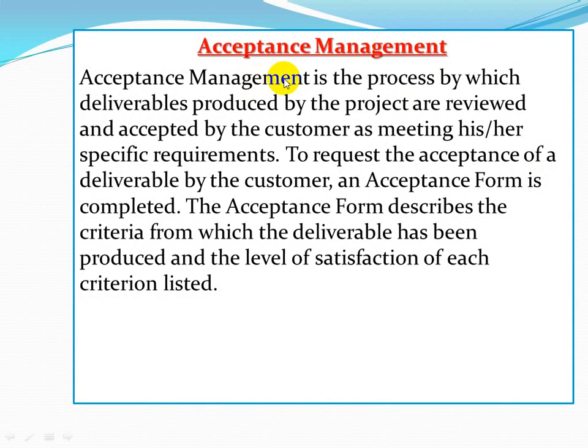नेक्स्ट जो है वो एक्सेप्टेंस मैनेजमेंट. Acceptance management is the process by which the deliverables produced by the project are reviewed and accepted by the customer as meeting his or her specified requirements. To request the acceptance of a deliverable by the customer, an acceptance form is completed. The acceptance form describes the criteria from which the deliverable has been produced and the level of satisfaction of each criterion listed.